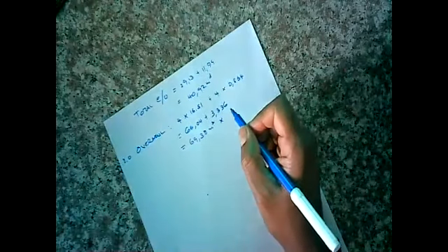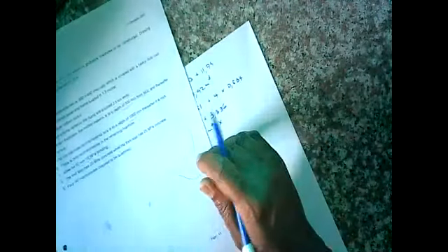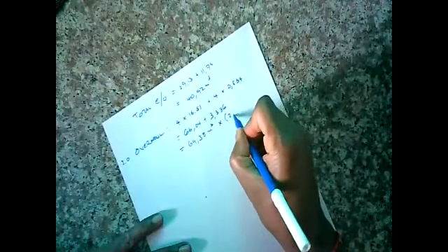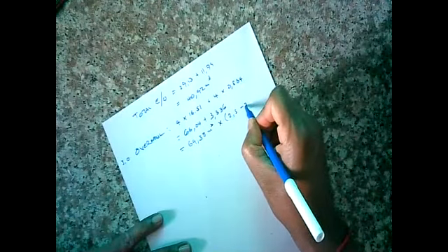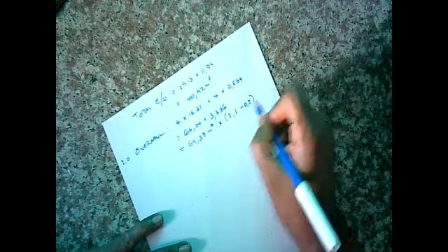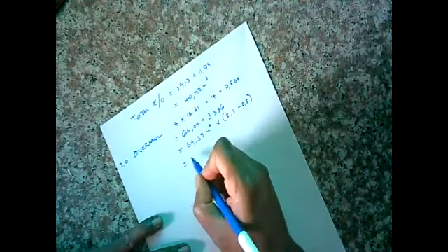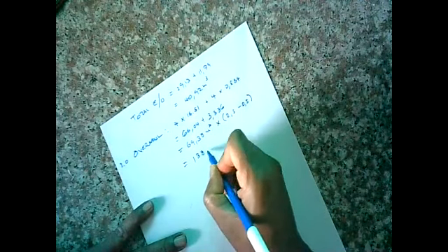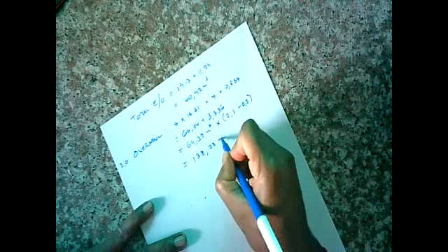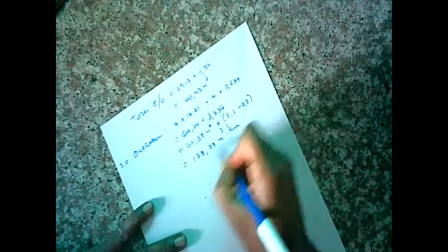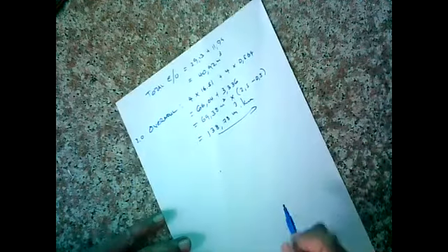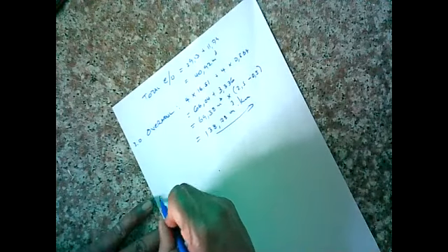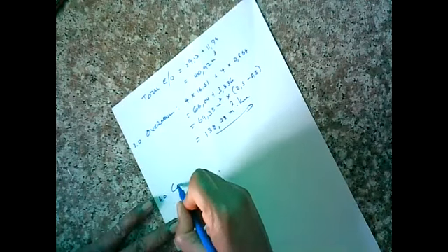What is the distance we're hauling? 2.5 kilometers away times 2.5 minus 0.5, which is the free haul, and what do you get? 138.78 meter cube kilometer. All right, what's next? 4.0, concrete.